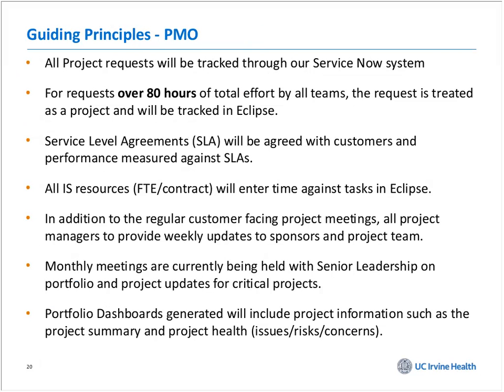Guiding principles of a PMO. This is really important. Everything's tracked through ServiceNow. Anything over 80 hours is treated as a project. We have another product in the PMO called Eclipse, although we're probably going to move to ServiceNow, because it does have a robust tracking system now.